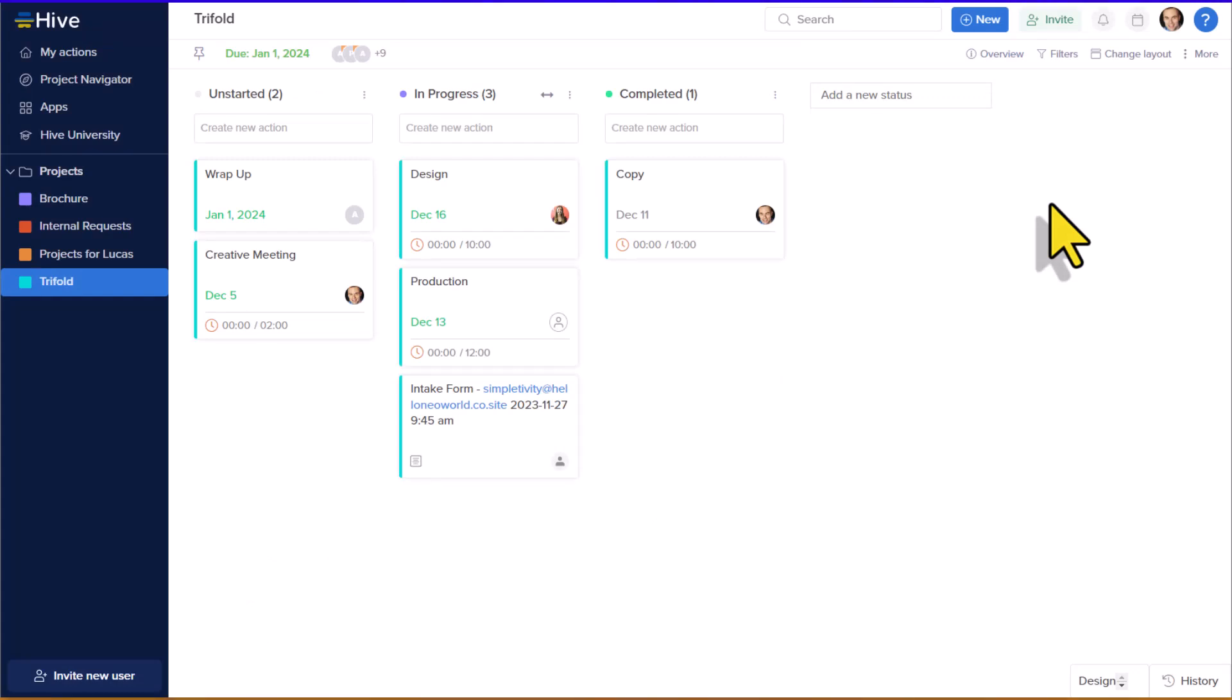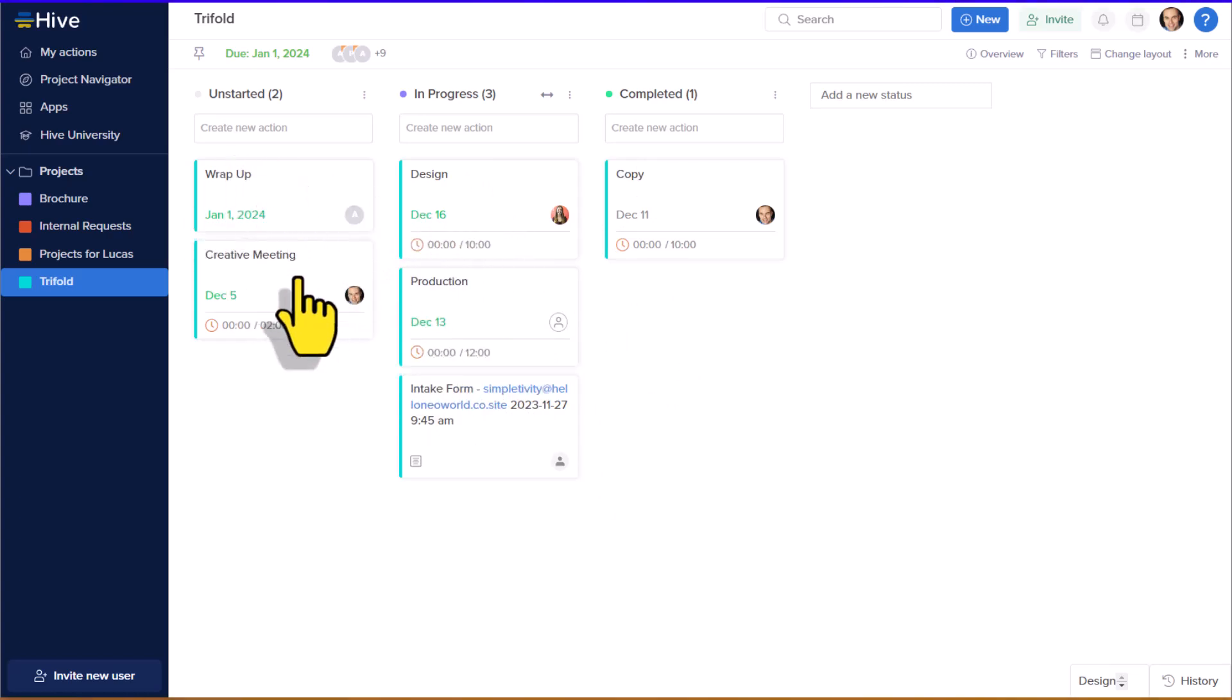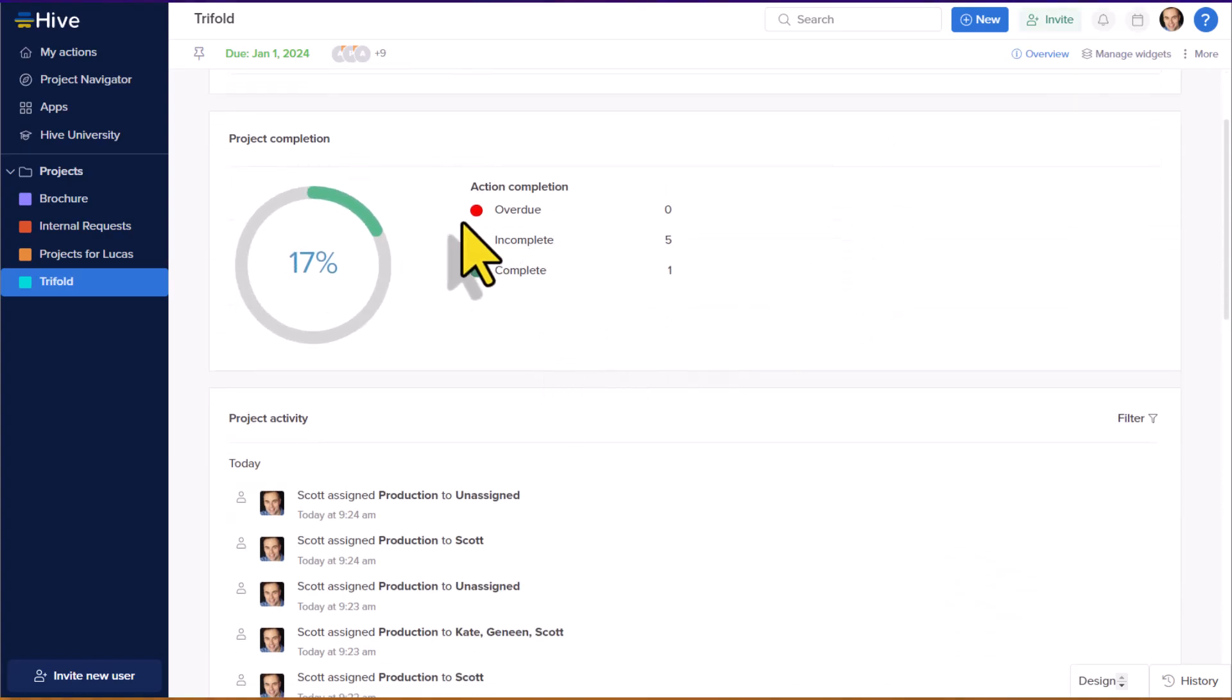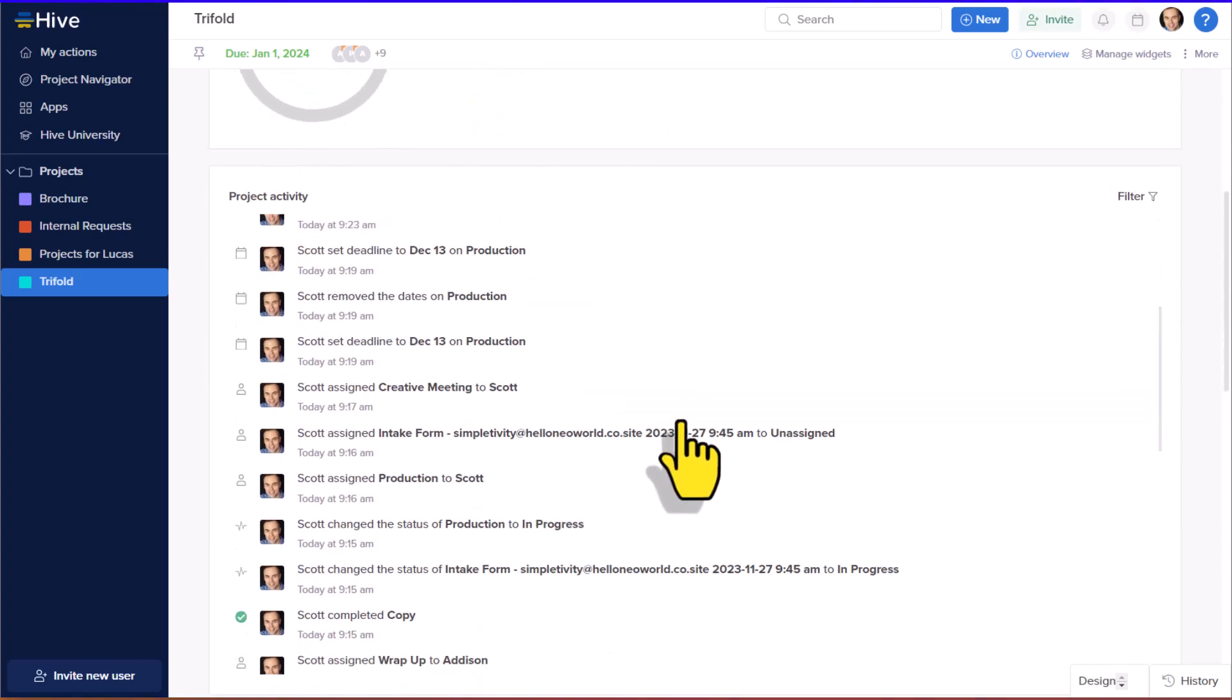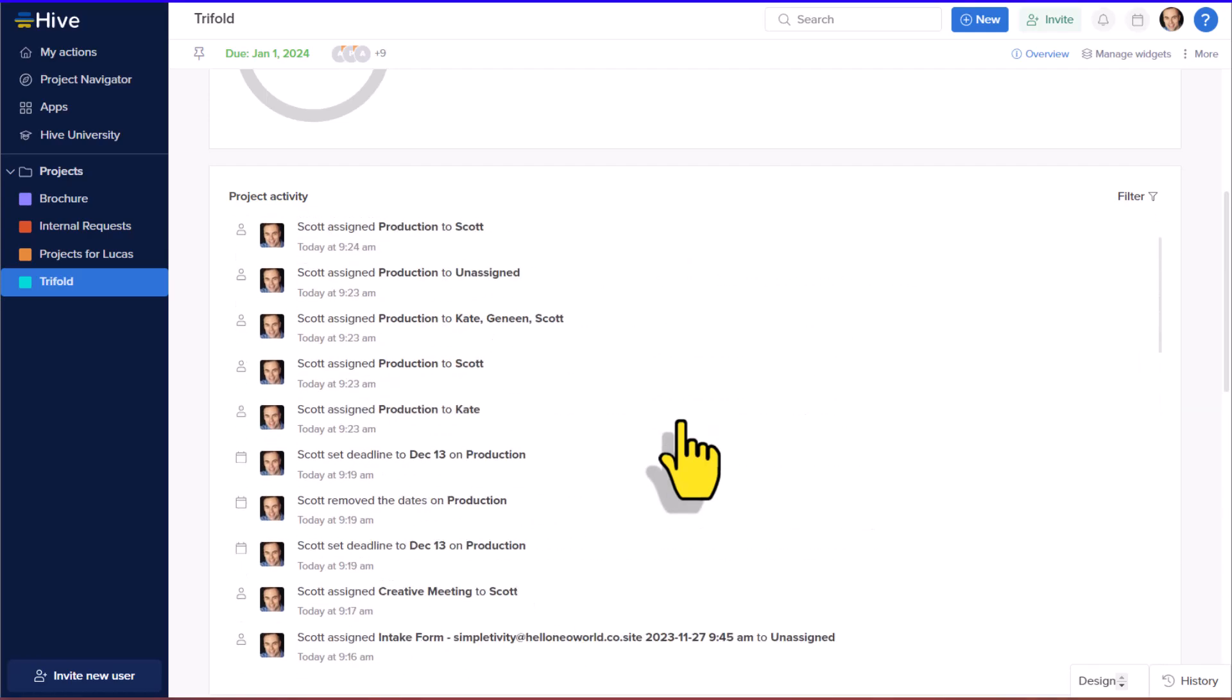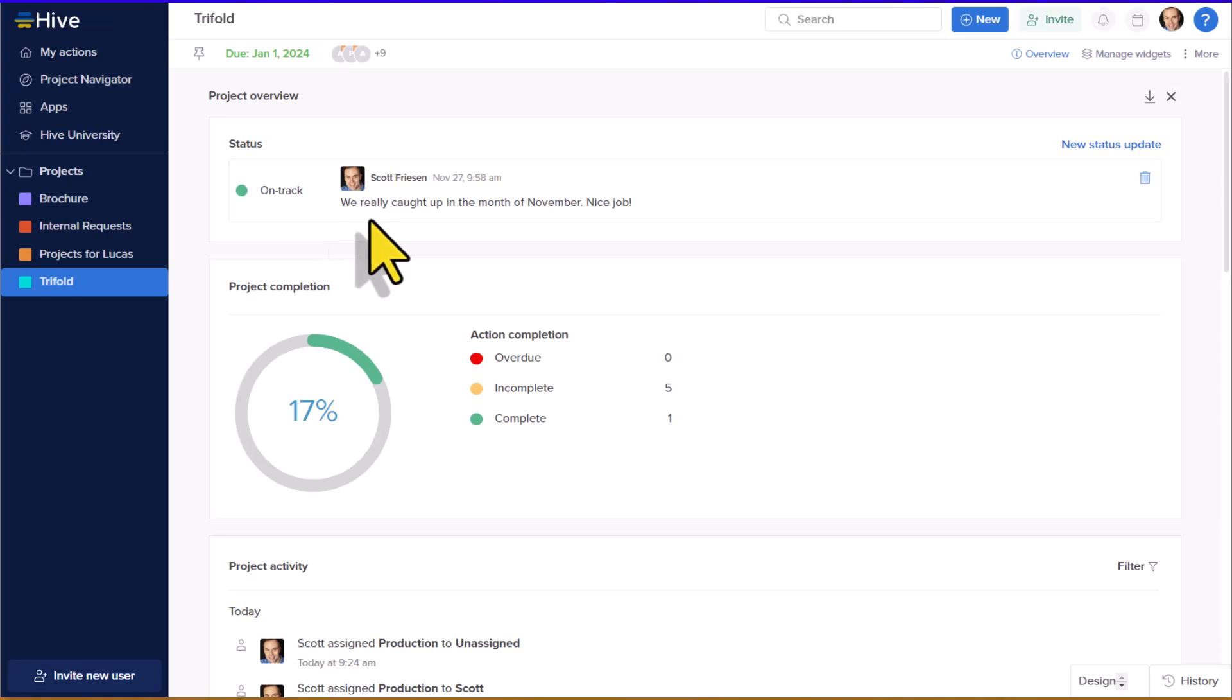Now a fourth feature that often gets overlooked when it comes to our project management software is creating an overarching goal or an overview of what is going on. Far too often we set up our projects and they seem to be ongoing. We're always going to have a number of things that are either unstarted, things that we're working on, and things that are completed. But what are some of those key milestones and are we staying on track? Well, here in the top right-hand corner, you can see that there is an overview section where we can see exactly how many things we've completed, how many things are overdue, and we can also see a summary of our project activity. So this can be a great place to get caught up to see what has been going on. So here you can see that just a few days ago, I've let the team know that we caught up in this month. Nice job. We are back on track.